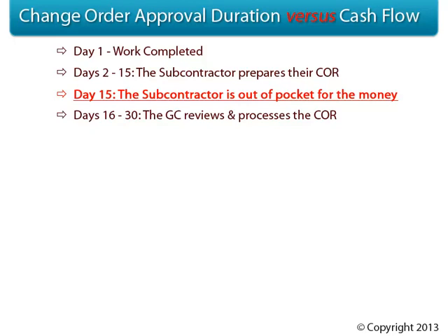The general contractor needs to review every change order request that comes through their office in conjunction with all of their other duties. They often have questions that a sub needs to answer, and fairly frequently they need to request revisions from subcontractors before they can submit the change order request to the owner.